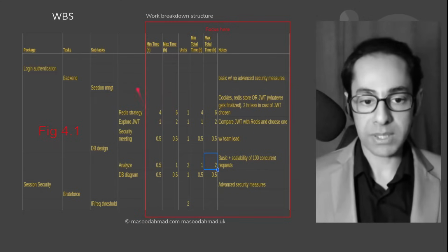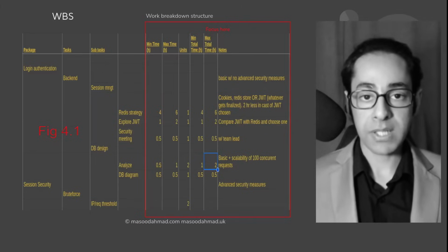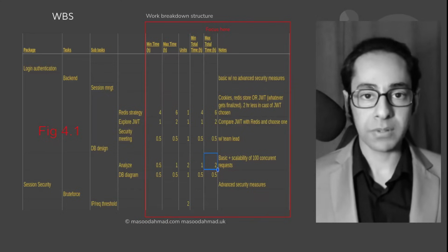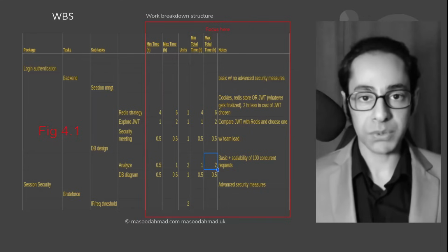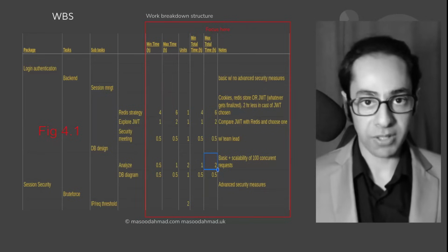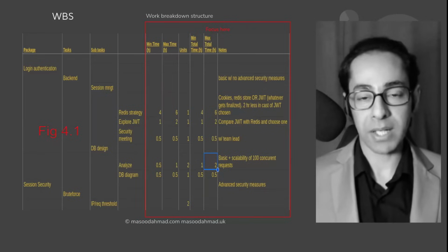And remember, the time for each task is to get it done. It can include meetings, self-review, self-QA, debugging, solving the bugs before declaring it complete or after declaring it complete. It is the total time in an ideal situation. I advise my peers that it is not normal to have bugs. It is not okay. It is not just casual thing to have bugs or spend time in meetings.